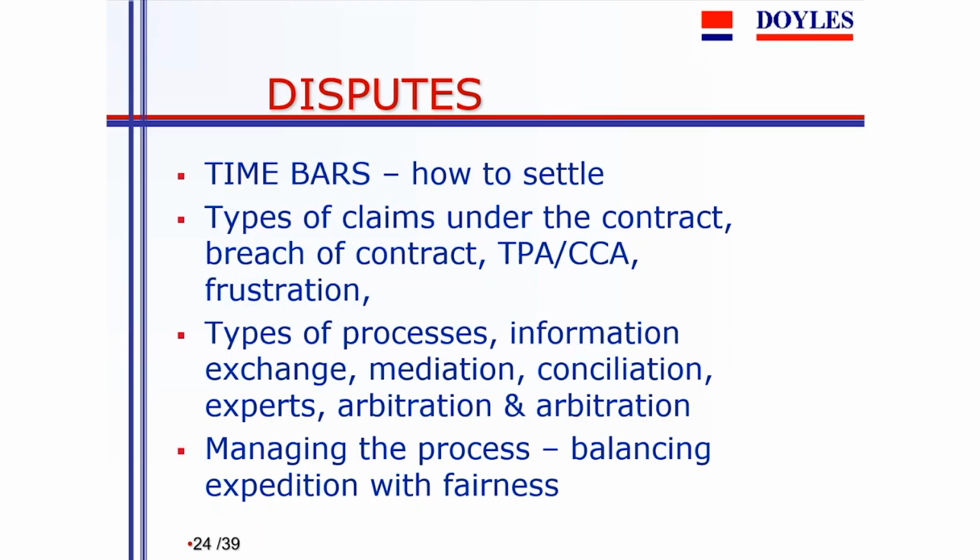So expert determination is a good way of resolving disputes if the disputes are simple and straightforward and the expertise of the expert is in the relevant field. It gets more difficult with more complex problems, but experts can resolve a lot of things quickly and easily.